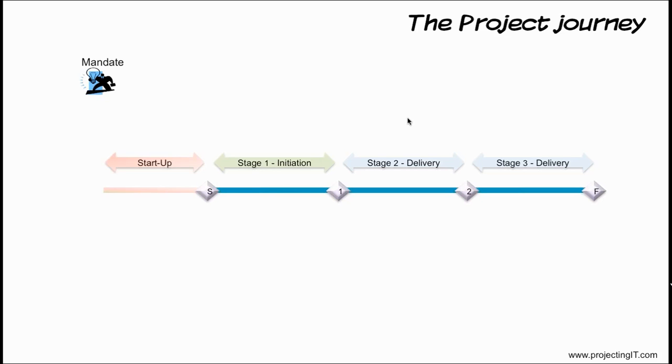Some of these are created by the team manager and the rest of them are created by the project manager. The project board does not create products but reviews and approves them. The processes are written for the project board, project manager, and team manager. The project board uses the directing a project process.